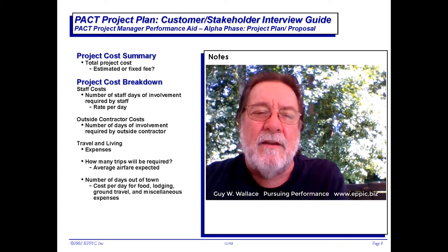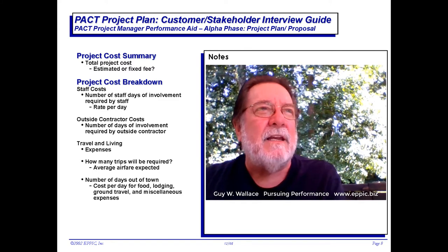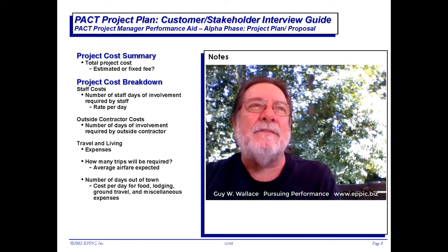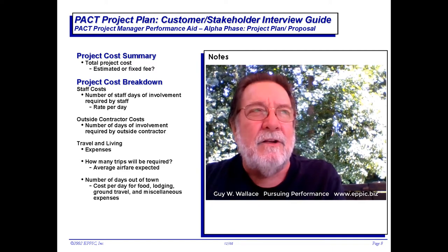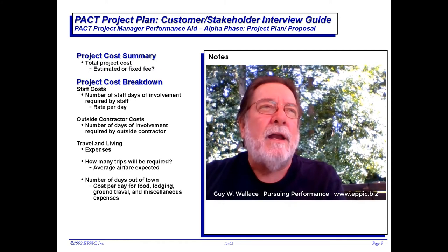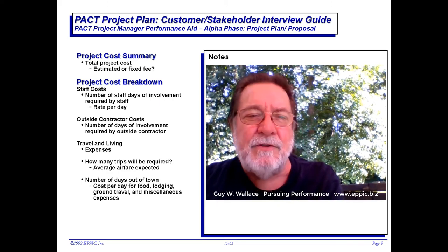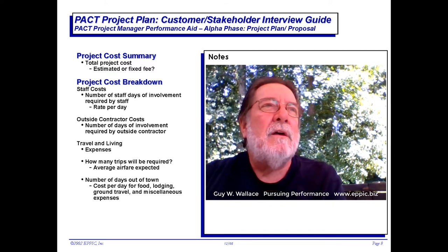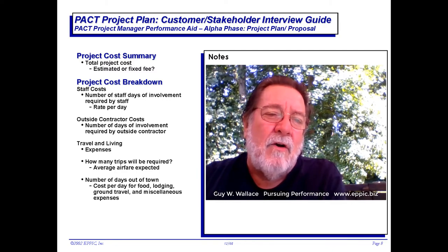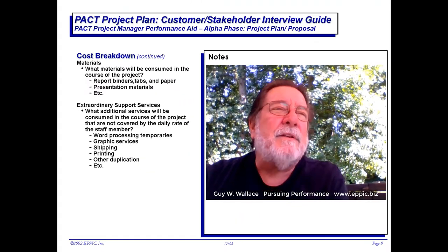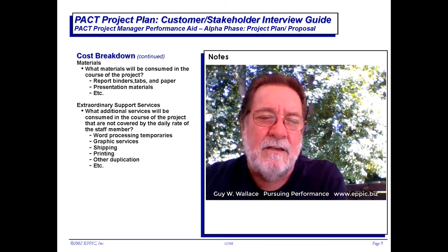We need to understand the number of days involved for each person playing various roles. Maybe the analyst is also the designer, or the lead developer with other people brought in. It's all part of developing a detailed project plan where you're trying not just to guess but to guarantee a schedule — identify major milestones, when we'll hit them, and when we'll be done and hand things over for deployment. We also need to consider travel and living costs, materials, who pays for printing, and any extraordinary support services.